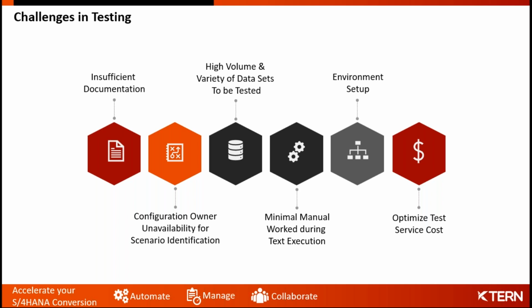The other problem would be the higher volume of data sets to be tested, because typically we've seen systems which have around 102 company codes. So you can imagine the volume and the variety of data sets required for each of the test cases or the test scenarios. The next thing would be the environment setup, because it plays a key role here. Maybe a fully configured environment is the right place to test, but at the height of the conversion projects, there could be human errors where we might be testing in the wrong environment, coming up with failed test cases for almost all of the test plan, which has to be taken care of.